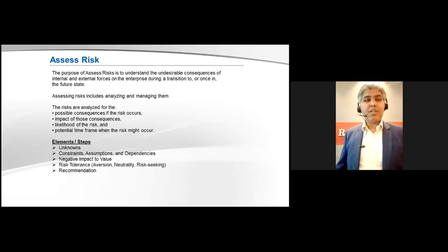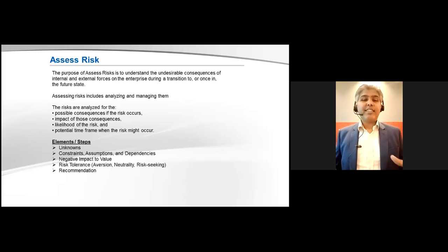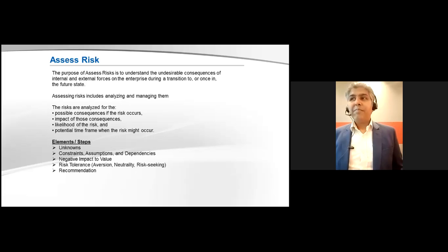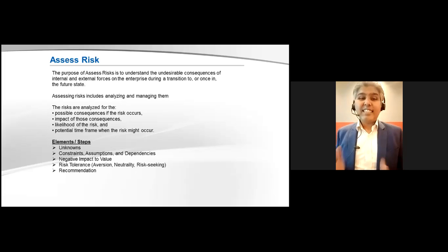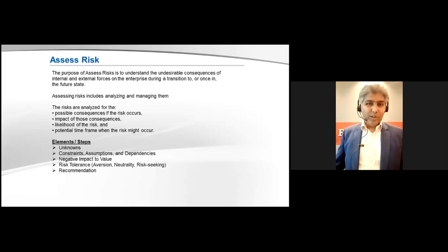After constraints, then every assumption. What is an assumption? Assumption means the one you are considering. So you are considering that the budget will be there. You're considering that the cash flow will always be there to finish this project. You're considering that the proper skill set will always be there to fix it. So all these assumptions are also risks. So you have to note them down in the risk register. Okay.